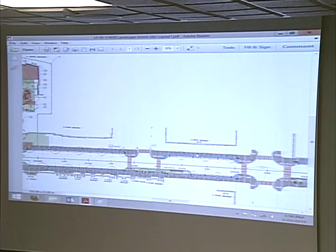If it's possible to make this work, I think it would be worth setting ourselves a deadline and saying, within the next X weeks, we're going to try to figure out whether or not that's an agreement we could come to with the property owners, and if not, we're going to proceed without. I feel like that would be a reasonable way to approach this, but that's just me. I defer to my fellow council members to offer your perspectives on this, but I would think that would be a better approach. I realize once we get past Baptist to the east, we're then going to have a negotiation with, I think,